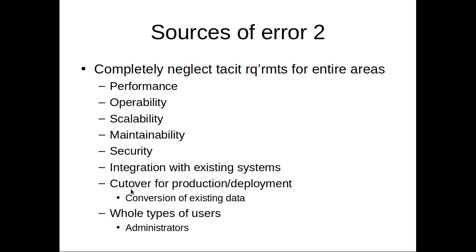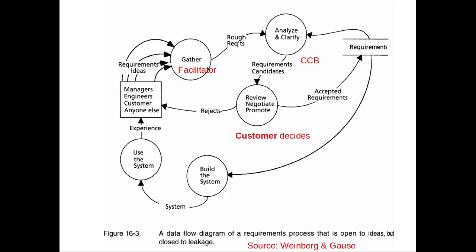Whole types of administrators. This is a really important one. Okay, you're working on a great new system for them. Great. Maybe they've got an existing system. What they often won't mention is something that takes a huge amount of time, and that's the cutover between the two systems. So you have the old system, it has all sorts of data. You have the new, much better, spanking new, shiny system, and you've got to bring data from the old system to the new system. What's worse is that data has to be brought really quickly. Why? Because you want to cut over from the old system to the new system in like a day. You want to be able to stop using the old system and go to the new system. If that process takes a long time, then they're still using the old system, and now you have to get more data over. And it's not converging, and it's not a neat process. So often you want that to occur over a holiday or a weekend or what have you. But you can't leave it up to chance. You've got to get it in place.